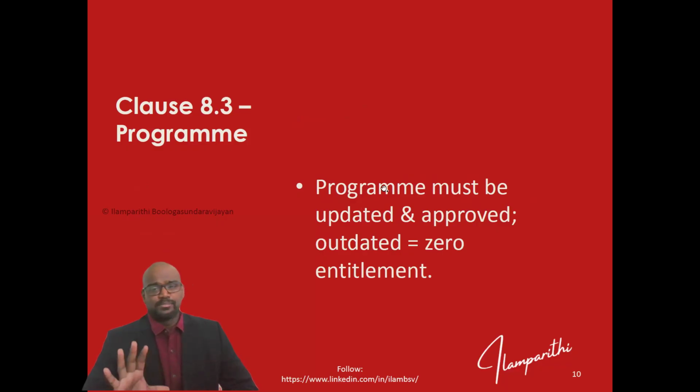Class 8.3 is a very important class. It directly connects with the program. The program is the foundation for the EOT, so the program must be updated and approved. If it is not approved, especially the baseline, it is going to create a very big question between the employer and the contractor on the EOT claim.